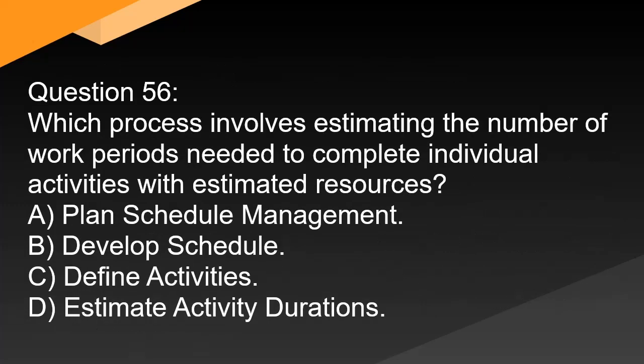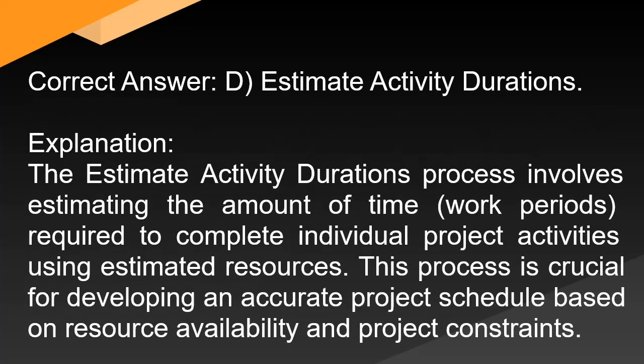Question 56: Which process involves estimating the number of work periods needed to complete individual activities with estimated resources? A. Plan schedule management. B. Develop schedule. C. Define activities. D. Estimate activity durations. Correct answer: D. Estimate activity durations. Explanation: The estimate activity durations process involves estimating the amount of time (work periods) required to complete individual project activities using estimated resources. This process is crucial for developing an accurate project schedule based on resource availability and project constraints.